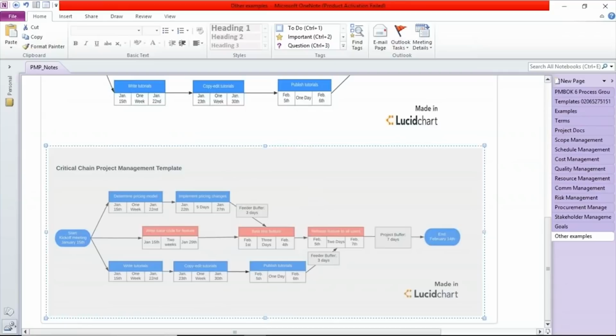And this is done backward. We used to first keep the end goal in mind, and from there we used to start working backward from the end goal, as you can see on the screen. So we have an end goal in mind, and then we put in the project buffers. Those project buffers take into consideration any resource constraints. If for any reason there are not enough resources available to perform a particular activity, how can we still ensure the activity happens properly and comfortably? For that, those buffers were very useful.